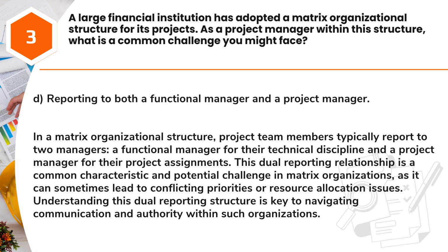Answer: D. Reporting to both a functional manager and a project manager. In a matrix organizational structure, project team members typically report to two managers, a functional manager for their technical discipline and a project manager for their project assignments.